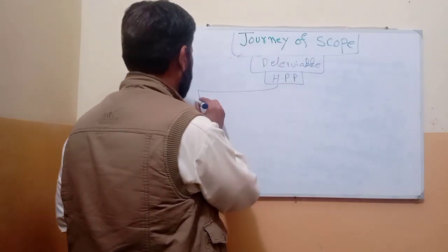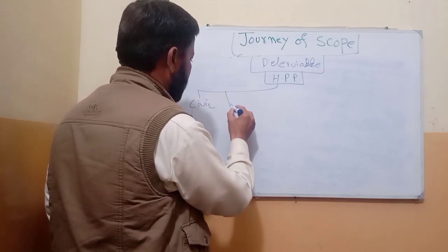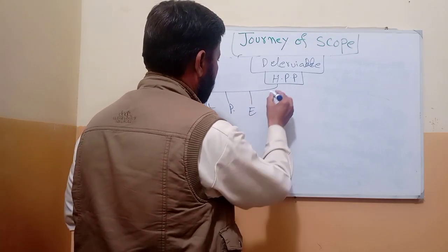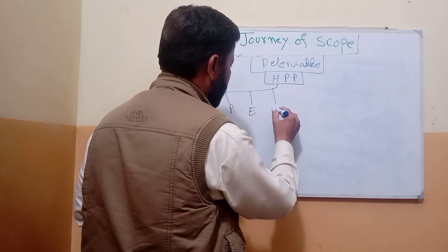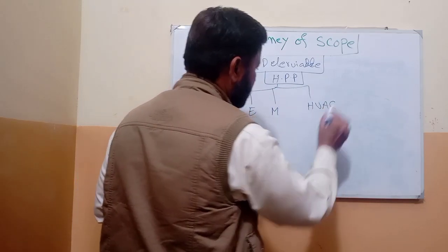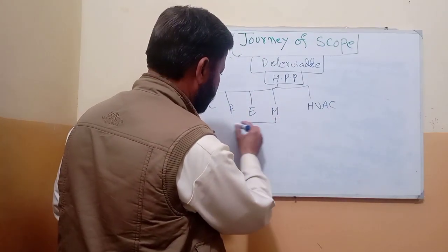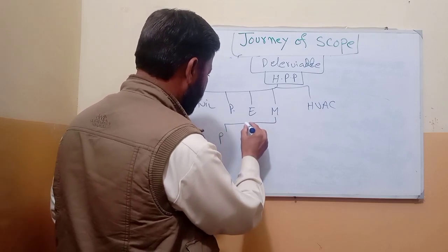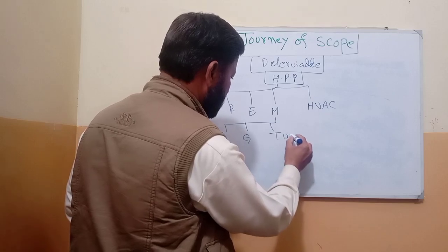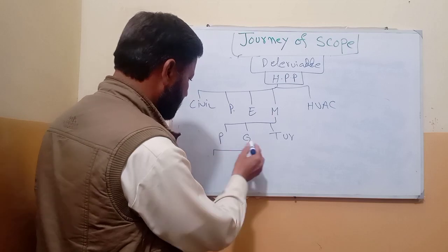In this we will have civil work, plumbing, electrical work, mechanical work, HVAC. Then we divide mechanical work further into penstock, gates, turbine.